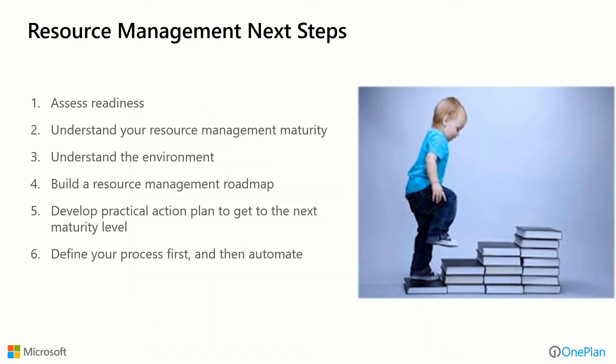The next steps in figuring out where you're at is to assess your readiness and really take baby steps. Understand your resource management maturity internally. Understand your culture — what it will absorb or allow you to accomplish early on, or what might take time to introduce. Build a resource management roadmap: here's what we could do today versus later stages we aspire to. Develop a practical action plan to get to the next maturity level. It's usually best to define a process first and then automate it in a solution, as opposed to trying to automate something that doesn't yet exist.